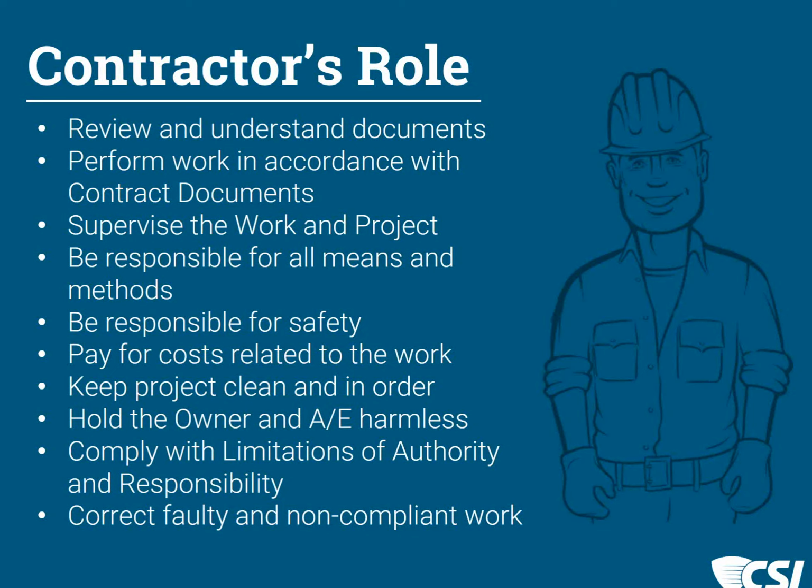And they have to inspect the work and determine that it's ready for subsequent work to move forward. So as part of their responsibility and means and methods, they have to be sure that Part A is done before they begin to do Part B.